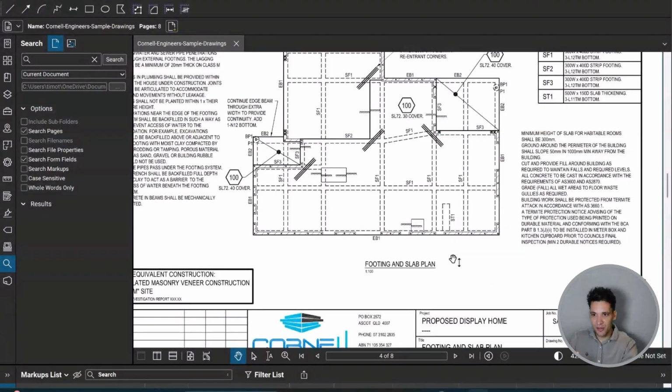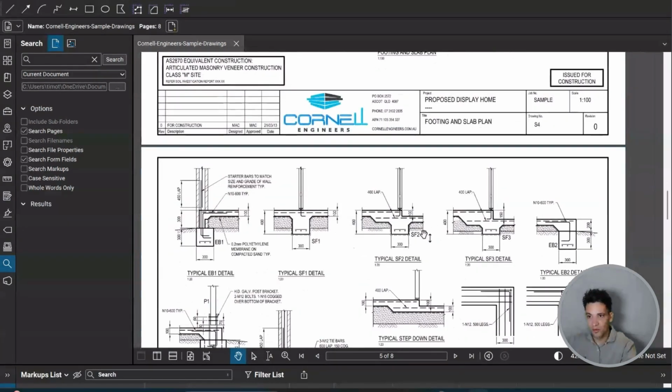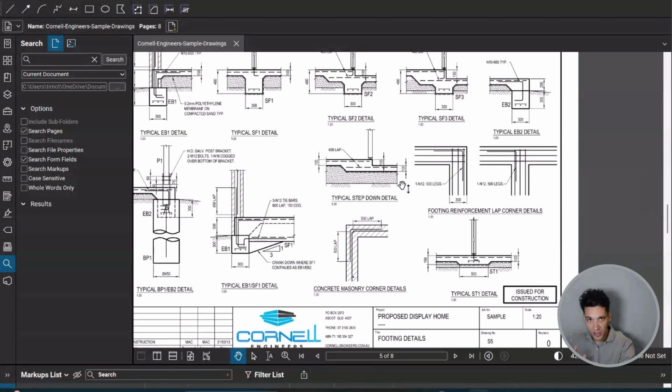We're going to break it down into a series of tasks and we're going to start entering it into a Gantt chart. So we've got this concrete slab. We can see it's a 100 mil thick concrete slab. There's a series of ground beams. Reviewing the drawings, you can see with the ground beams there are no construction joints between the beams, which means we can assume we can pour the whole thing at once.